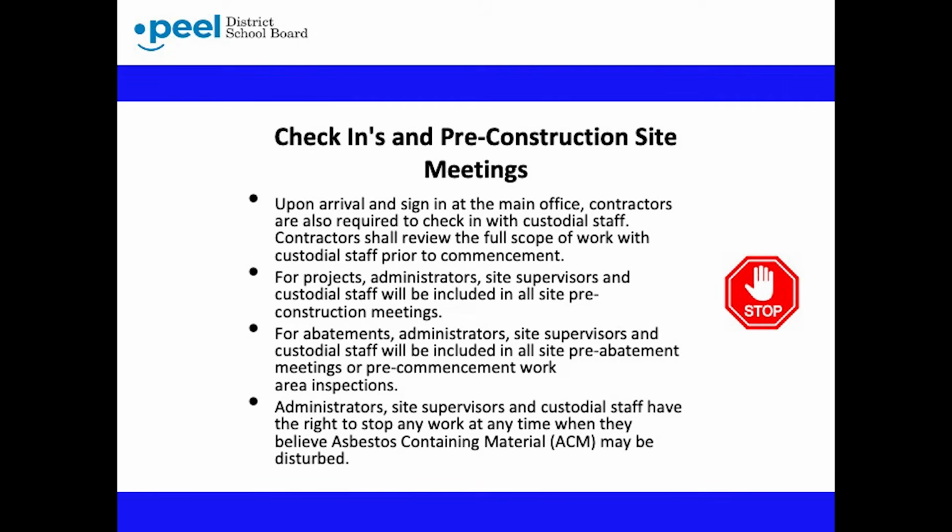Upon arrival and sign-in at the main office, contractors are also required to check in with custodial staff. Contractors shall review the full scope of work with custodial staff prior to commencement. For projects, administrators, site supervisors, and custodial staff will be included in all site pre-construction meetings.